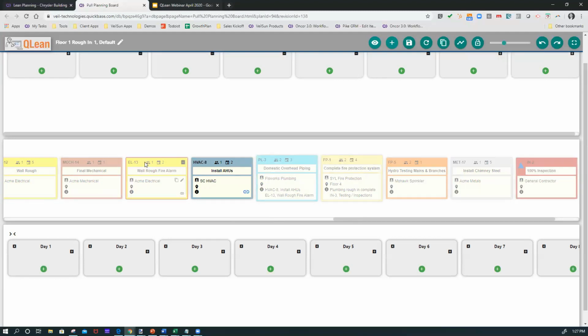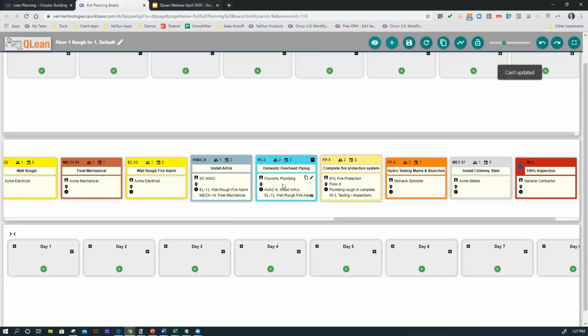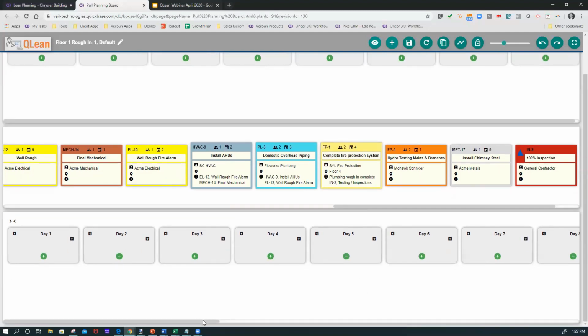I'm not going to link all of them, but just showing the functionality. And what this does is it does two things. When we generate the schedule, you can visually see, and it connects those in terms of formal predecessors together. But it also makes it so that when we get to the next step, and we're dragging things down, we don't have activities starting before another activity is complete that needs to be completed. So it's also a little bit of a safety valve.